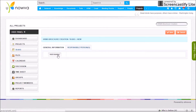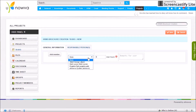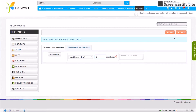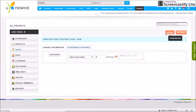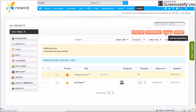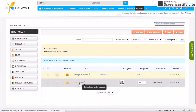Responsible Persons allows you to select which team member will be completing this task and how many man-hours they are allocated. Remarks is for any notes you'd like to save for that user. Enter everything and click Save. A task is created and a notification is sent to the assigned person so they know they have an upcoming task and can start and finish within the deadline. The milestone and new task are then visible in the list. You can keep adding multiple milestones and tasks across all projects.